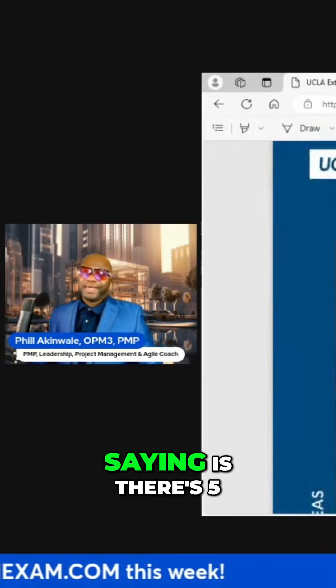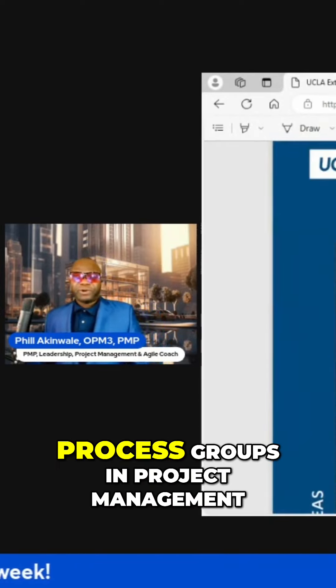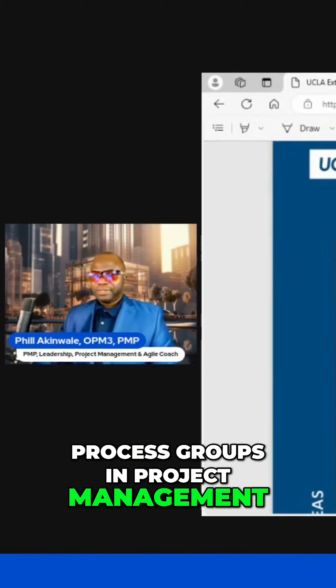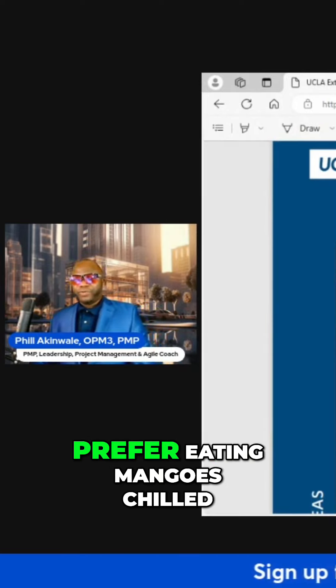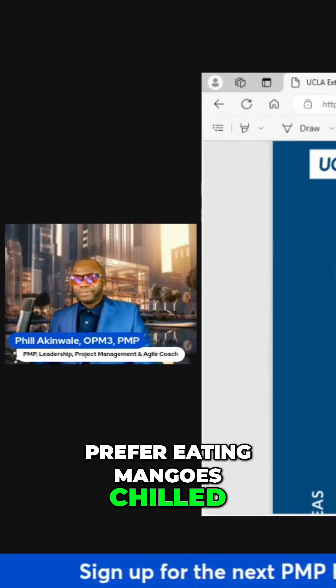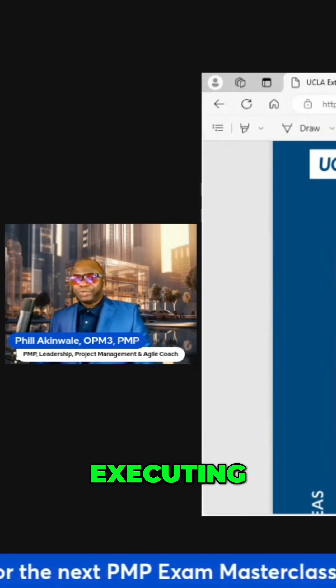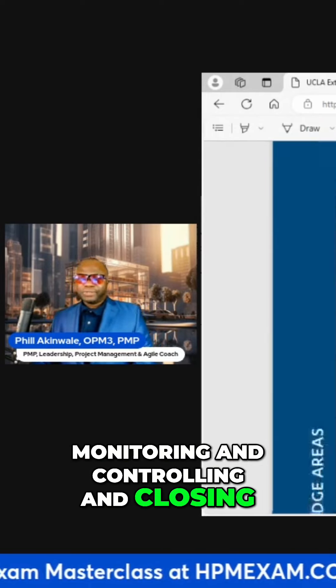PMI identifies five process groups in project management. The mnemonic for these is 'I prefer eating mangoes chilled,' standing for initiating, planning, executing, monitoring and controlling, and closing.